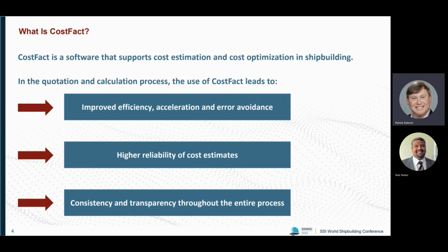When you think about the complexity of a cost estimate in shipbuilding, with lots of 1,000 rows, several users working at the same time on the same project spanning a period of several years, perhaps consisting of multi-hull ship series where we have to consider learning curves, non-recurring cost, and so on, and a lot of different suppliers, well, when we take all this into account, I think it's obvious that Excel is not always ideal.